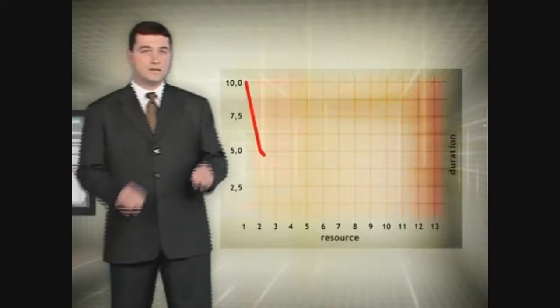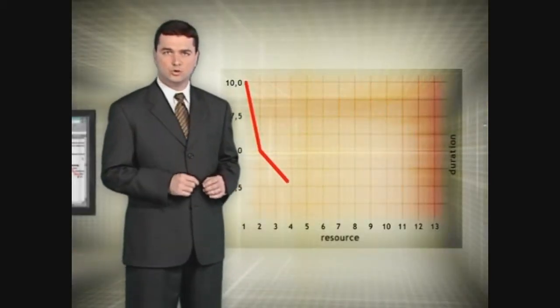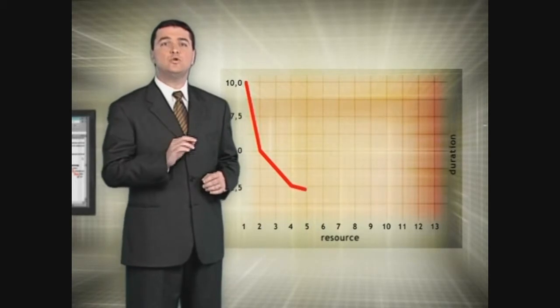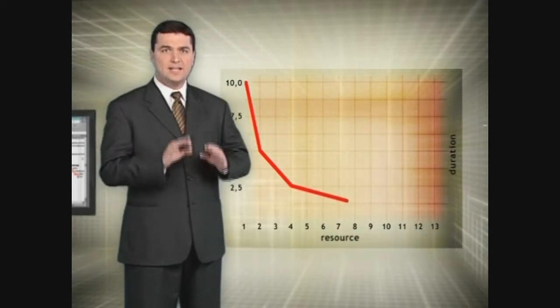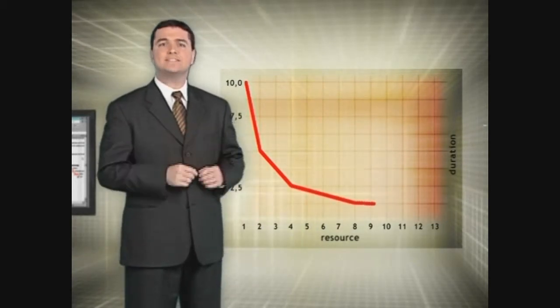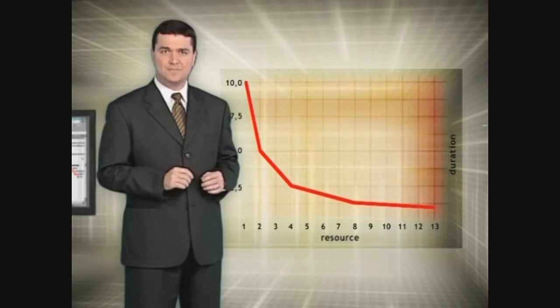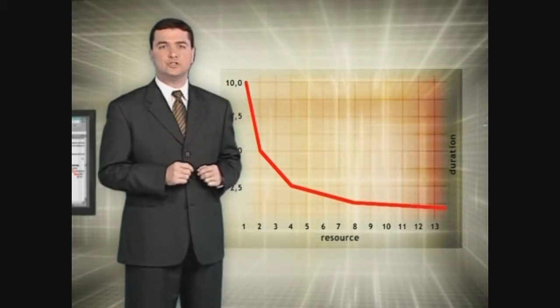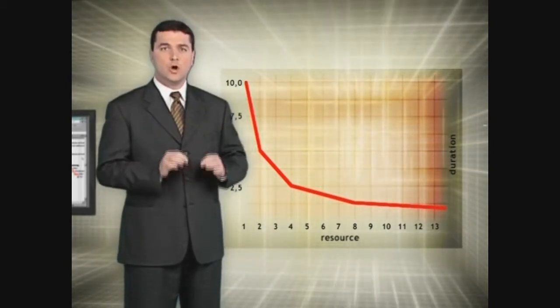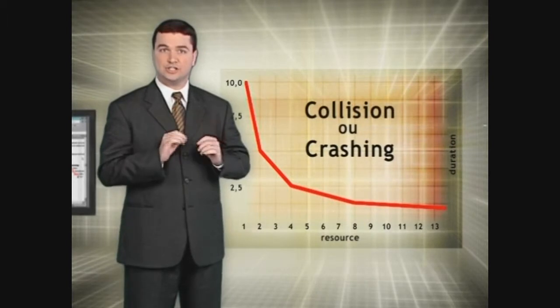But this relation has a limit to its validity. It would be absurd to say that 1,000 painters would paint the apartment in only 30 seconds. Finding the amount of resources that will produce a maximum reduction in the duration and working with this amount in the activity is a process known worldwide as collision or crashing.